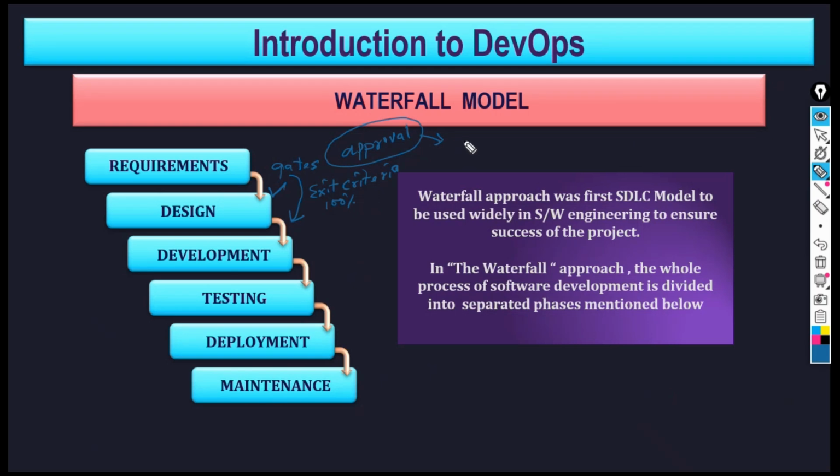Yes, one of them is the project manager, but the project manager or the business owner of the client. Everything will be on the client's permission or approval. There will be two project managers, one from the client side and one from the vendor side. If you say the PM of the vendor side has given an approval, that is not right. The PM or the business owner of the client side has to approve through some documentation.